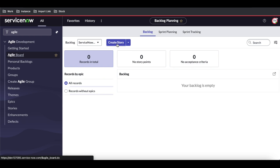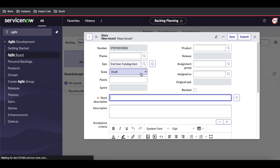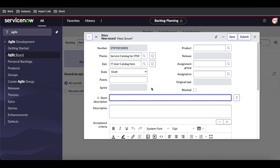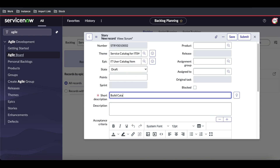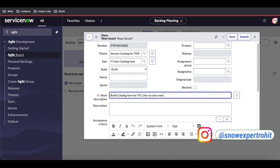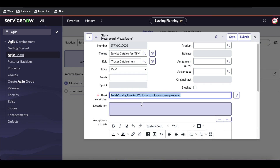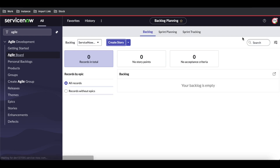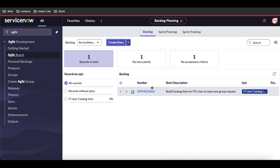Most users have access to create stories. I'm going to create a story. I'll select the 'IT User' epic, select the theme as 'Service Catalog,' and for the short description I'll write 'Build catalog item for IT user to raise a new group request.' Each story should have acceptance criteria mentioned, and once submitted the story is created and appears in the backlog.